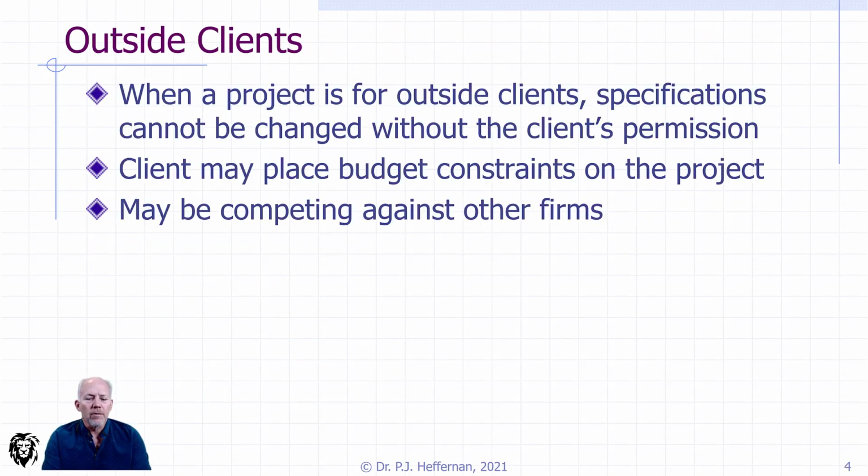So one thing worth noting is that depending on the governance structure of the project and whether you're working for outside clients or if it's just an internal project, it changes some of the control issues associated with the project, and that should all be obvious within the project charter. So if you're working for an outside client, then clearly the client has an interest in, if not outright control over, the budget. And so you have to be aware of what those control structures are.